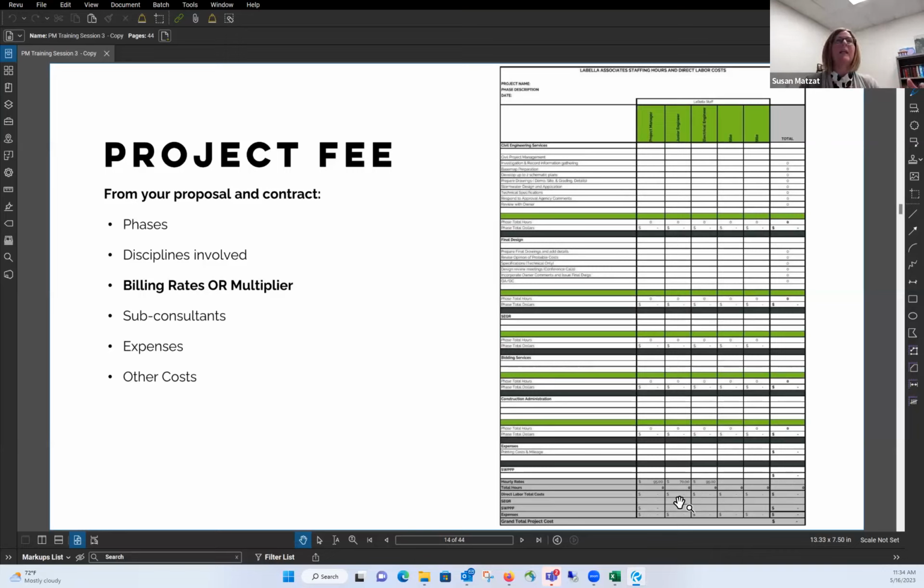So as I mentioned, just identify with the client project manager what the level of involvement is and how you're going to communicate with stakeholders. We don't want people from our team reaching out to stakeholders directly if the client says, we're going to do that. You provide it to us, we'll talk to them. But definitely need to know that up front, because we've certainly gotten into cases where a client was not happy that some of our people reached out directly and they weren't included, and hopefully the project doesn't take a turn because of that.